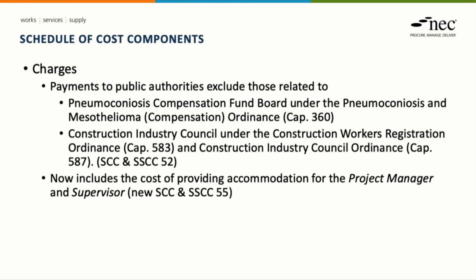Within the charges section, so this is section 5 of the schedule, there are a number of statutory charges that are excluded, as noted here. And then costs associated with providing accommodation for the project manager and or supervisor have now been included within the charges section. They would have been included under the equipment section previously.